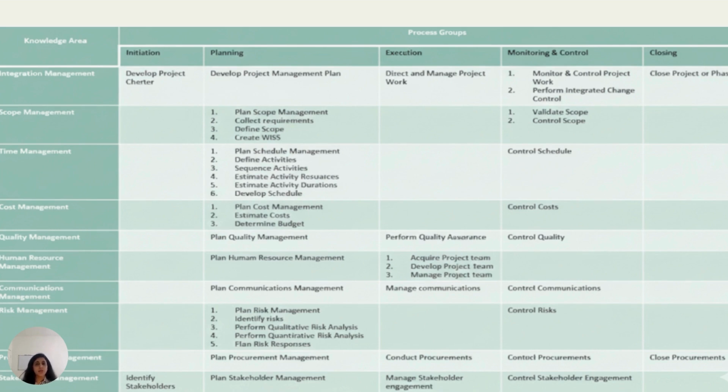Once you have that, you manage the stakeholder engagement. This is the execution phase: communicating, working with them, and resolving any issues that arise. And finally, you monitor or control stakeholder engagement. What is it? It's the checkpoint. Are our strategies working? Are our stakeholders still supporting us? So you do all of this in the monitoring and controlling phase, that is control stakeholder engagement.